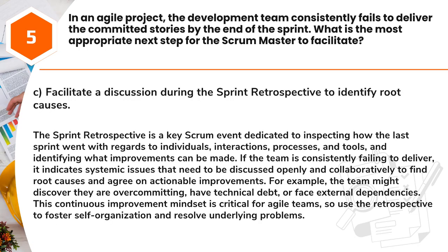Answer: C. Facilitate a discussion during the sprint retrospective to identify root causes. The sprint retrospective is a key Scrum event dedicated to inspecting how the last sprint went with regards to individuals, interactions, processes, and tools, and identifying what improvements can be made.